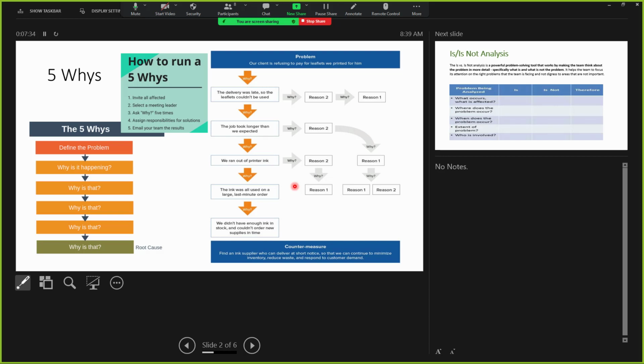Or for example, if painting the walls of, let's say, the whole block B will take more than 8 hours and will not finish in one day, say it will take 160 hours. It's neither 8 nor 80, so you will break it down into 2 zones. Then each zone will be one task of painting walls, and each task will take 80 or fewer hours. If you say you want to continue breaking down, you have this group or folder for the schedule, so we will never do that. Correct? This is the same. You will limit yourself to 5 whys, and you have to train yourself to reach that root cause and start solving it.